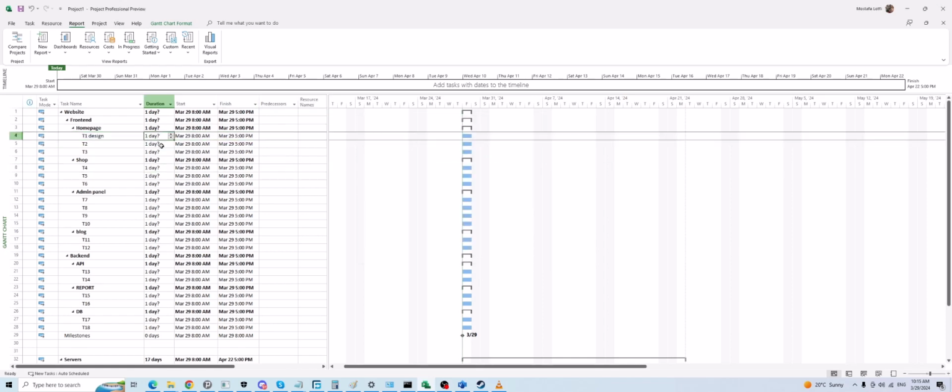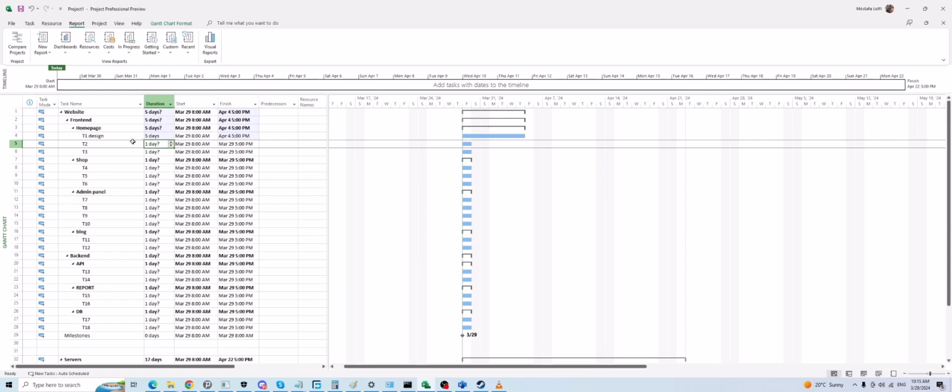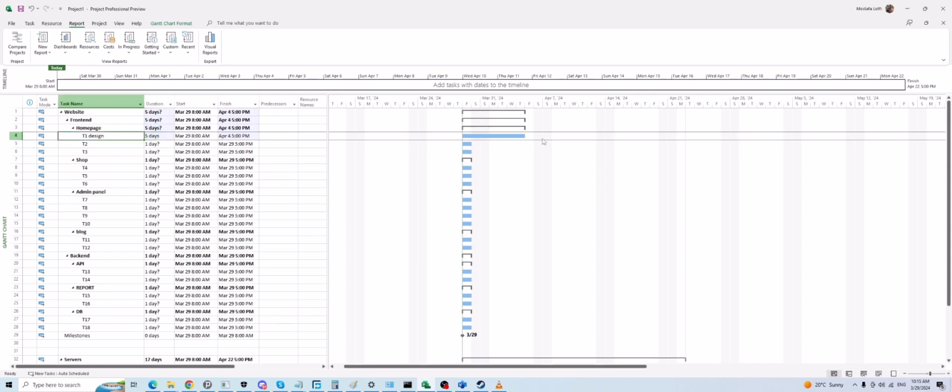Let's say design is 5 days. So what you do is you have a graphic artist design the UI, make it nice, make it beautiful, different colors. But for example, the marketing team needs to approve that UI. You need to define this because it's very important. You need to define this, or even the customer should approve the UI.